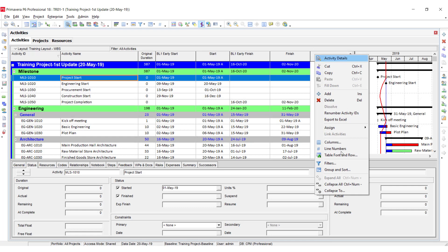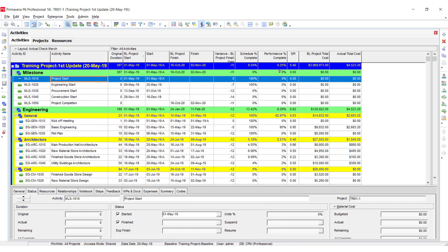If you want to see the variance in the columns, you have to select some variance columns. I have added the variance for the project finish date — it means that we are 11 days behind what we have planned earlier.